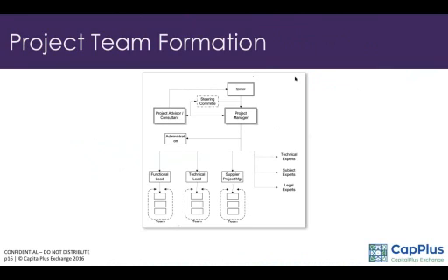Also, you need to ensure that key positions, such as the project manager, should not be changed during the project. I think I covered this. I had one experience where I mentioned that there were 3 project managers within 8 months, which shouldn't be the case, as it will definitely impact the project duration.